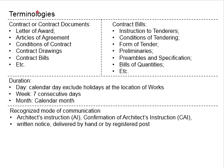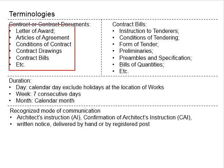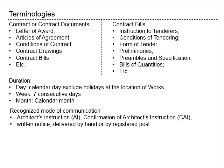First, we look at the contract or the contract documents. This refers to the list of documents including the letter of award, articles of agreement, conditions of contract, contract drawings, contract bill, and so on. The letter of award is a letter sent by an employer as a written confirmation that the tenderer has been successfully selected and will be awarded a contract. The articles of agreement provide the information of all the parties involved in the contract.